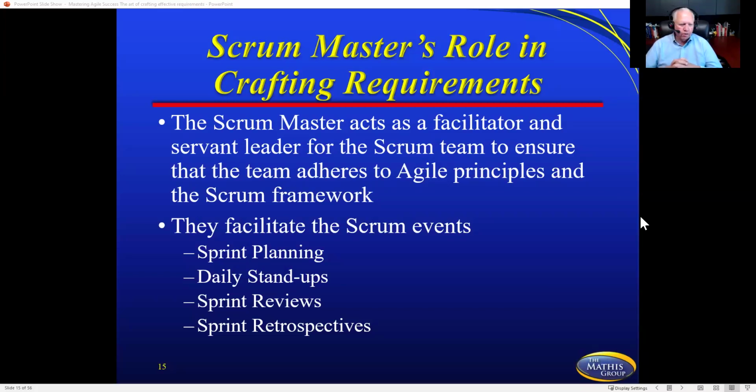Some people have mistakenly thought that a Scrum Master is actually another word for project manager, and that the Scrum Master technically has power over everybody. That's not normally the truth, and almost none of the texts that are out will support that. So the Scrum Master is more of a facilitator, and the facilitator is the right word because that person is making sure the methodology is being followed, that we're negotiating different aspects, and that they function as a servant leader. They're trying to remove blockers for that team so the team can run wide open during execution.